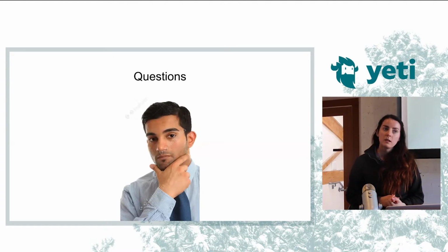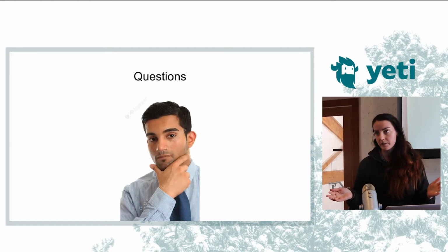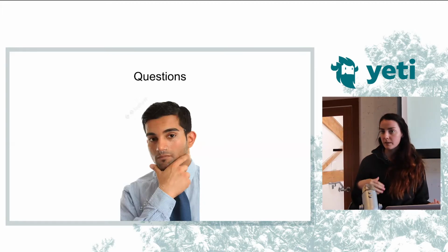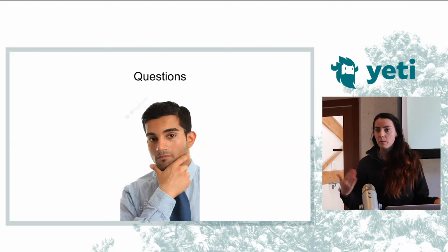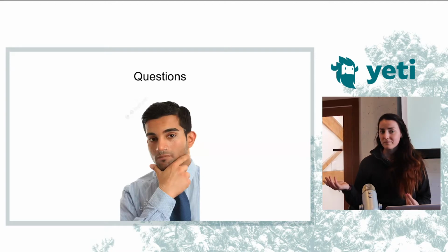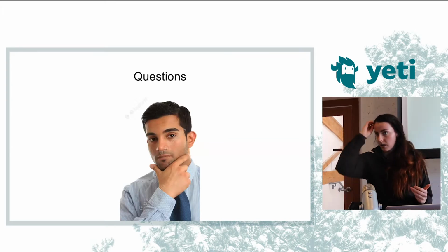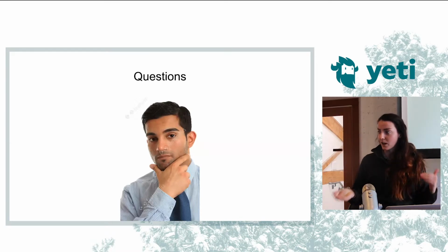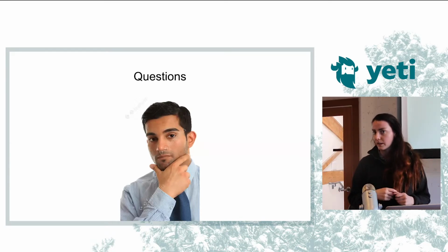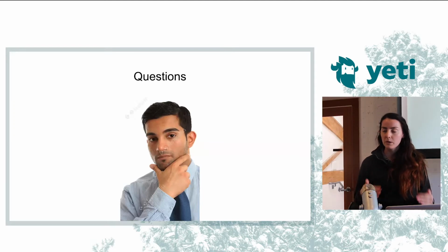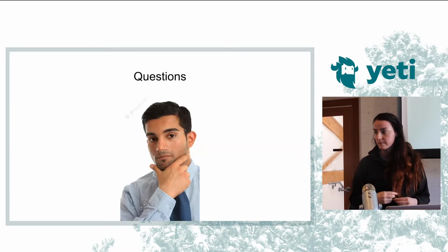Yeah, so what I've heard with working agreements is that usually they're brought up during the first part of the retrospective. So the first thing you would do is actually review the working agreement and maybe do thumb voting on if we feel like we're following it, if we're not following it, where we're not following it, and that would even potentially become a retro item to discuss. And then especially if we have a working agreement with a larger client, I feel like during those vision alignment meetings that we have with executives, bringing the working agreement up then, because they're not seeing it as often, it's easily forgotten, is always a good plan, especially if we have feelings on areas that maybe aren't working as well for us, to know what those are going in.